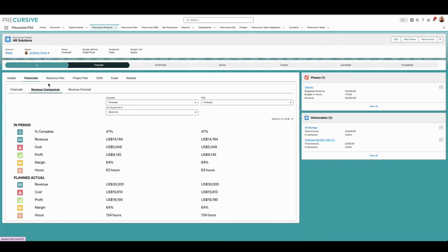So in terms of this revenue comparison, one of the things we've done is created a baseline, and we are then able to compare that with a forecast. Now, again, not really moved a lot of revenue around because our project duration has not changed because we locked that go live period. But what we can do is see how much revenue we're forecasting, what percentage completion we will be at this point in time during this period, which is in March of 2024.